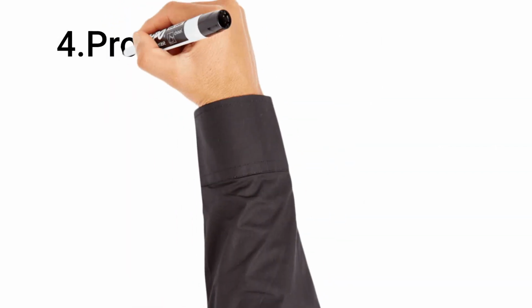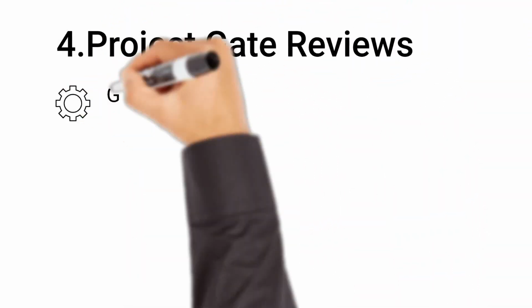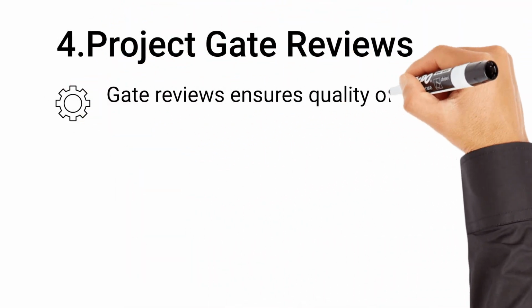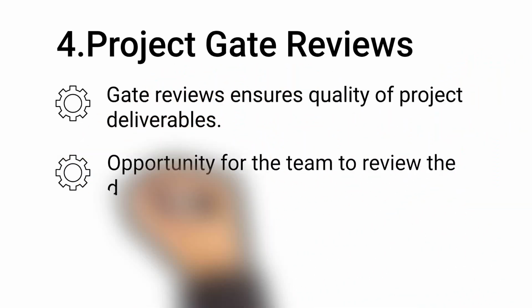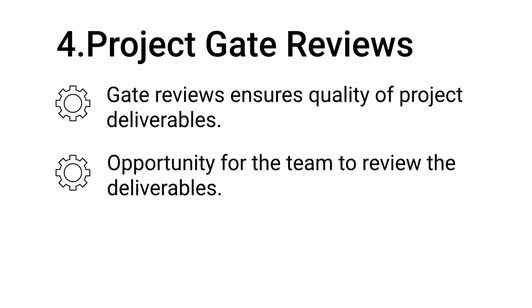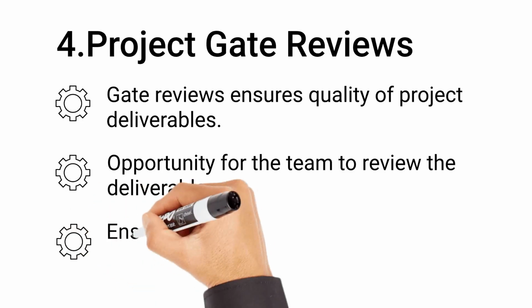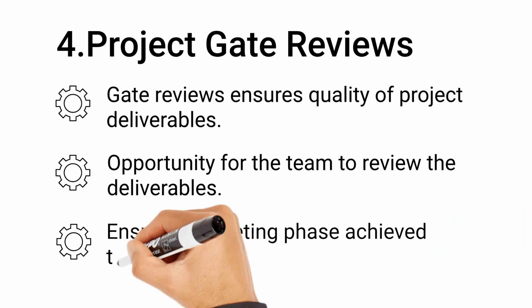Fourth one is project gate reviews. Gate reviews are a key technique for ensuring quality and managing expectations on project deliverables. Basically, it provides an opportunity for the team to review the required deliverables and make sure the desired result is achieved before moving to the next phase of the project.